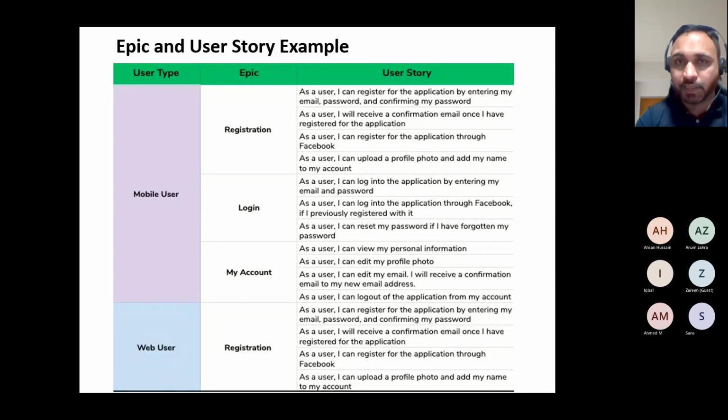You can deliver in a day. The total sprint length could be only 10 days, because when we say 2 weeks, we mean 2 working weeks, not including weekends. So in reality it's 10 days in total. You have to keep that in mind. Within 10 days, you have to do any analysis if needed, development and testing, and then user acceptance testing if possible as well.